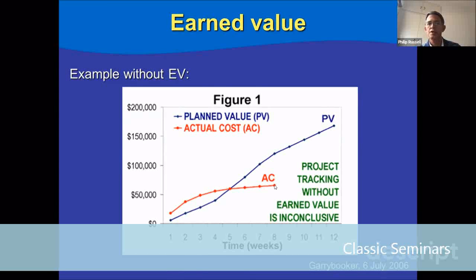We want to be able to go on site and count. If we're building a house, we want to count how many walls have been built, how much of the roof has been put up. We want to count those things that are done. And we want to add up and get a dollar value for all the things that have been done and completed.